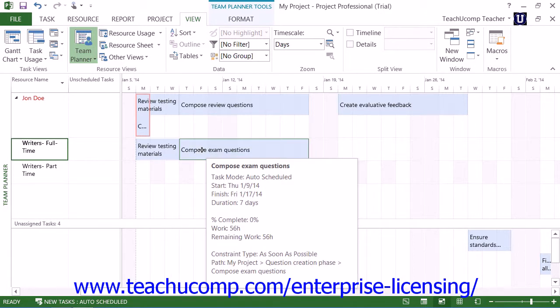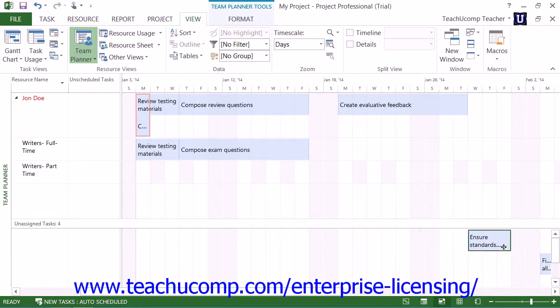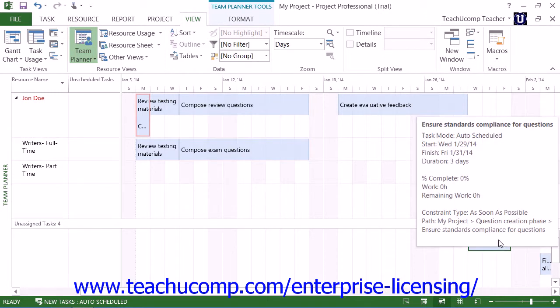Note that tasks that do not have a start date or an end date, which are called unscheduled tasks, will appear next to the resource name within the left pane. In the bottom pane, you will see project tasks that have not been assigned to any work resource.